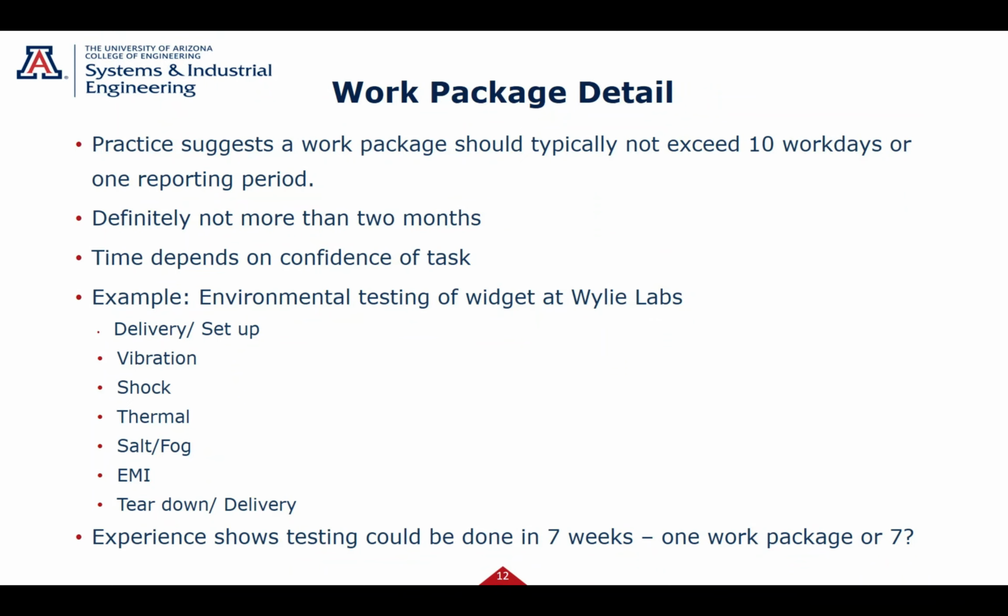Typically, we say 10 work days or one reporting period. So if you want to be able to measure things in pieces, you try to make these packages pretty well defined. Okay? I would say as a general rule, every two weeks, that's 10 work days, no more than two months.